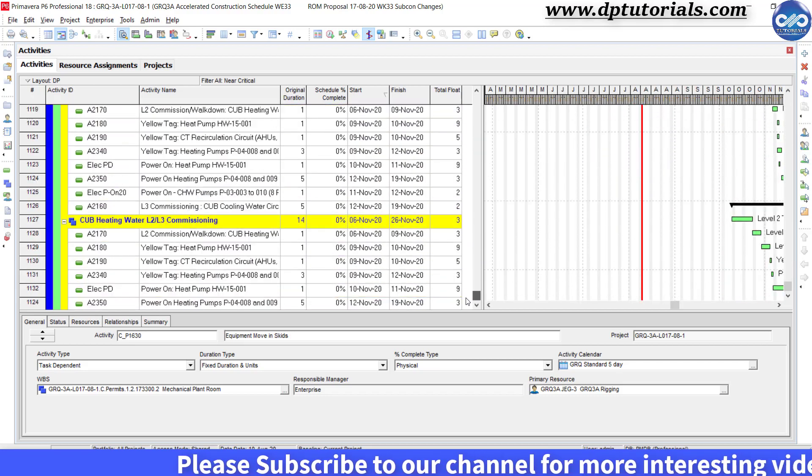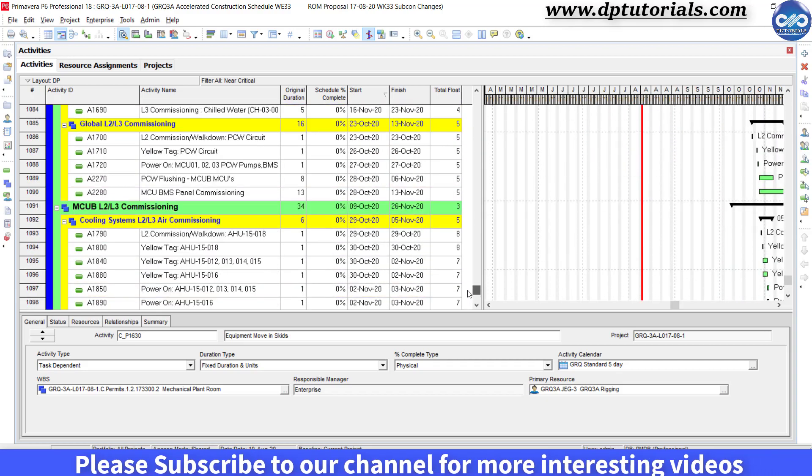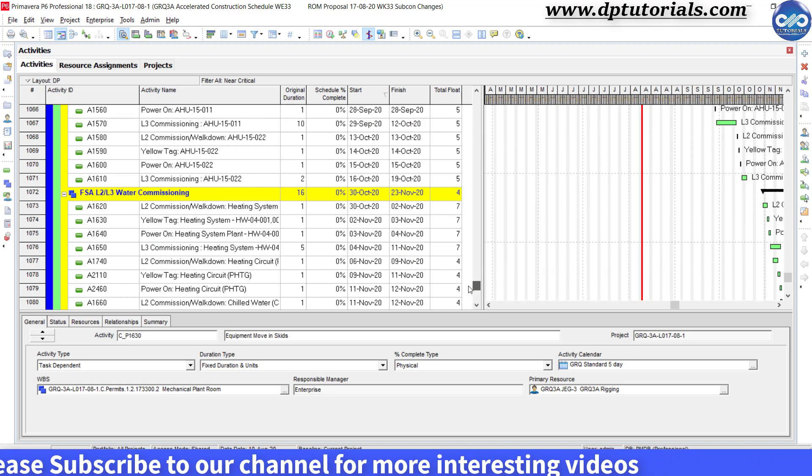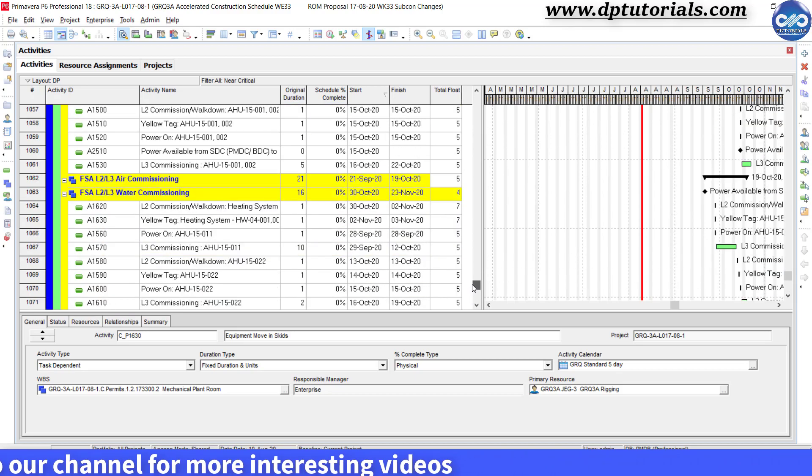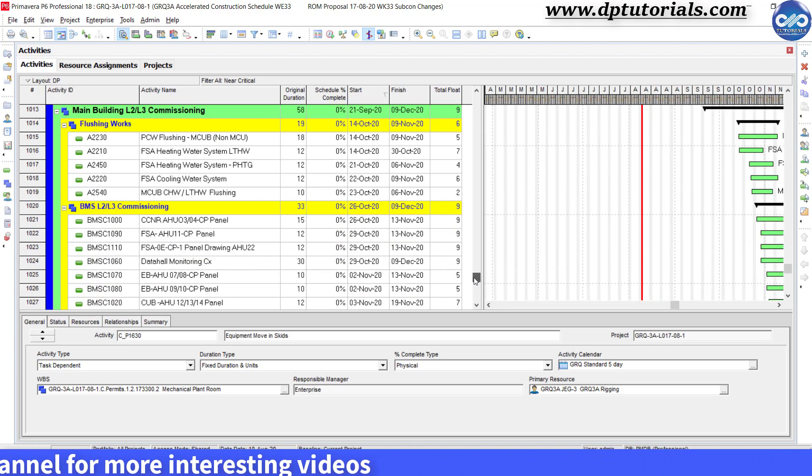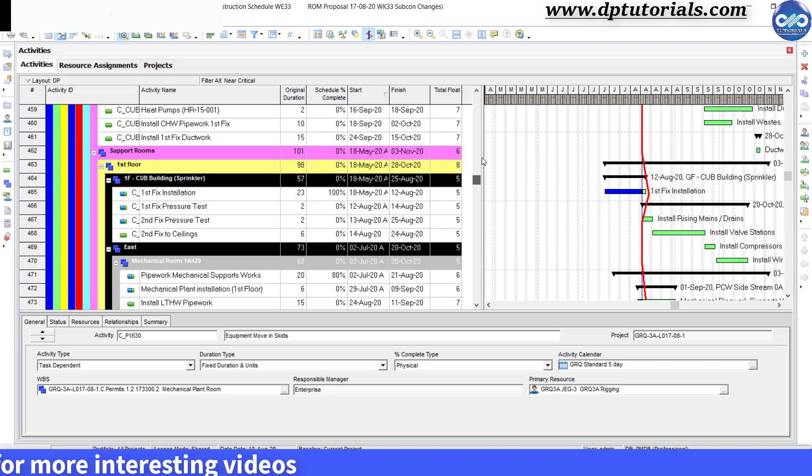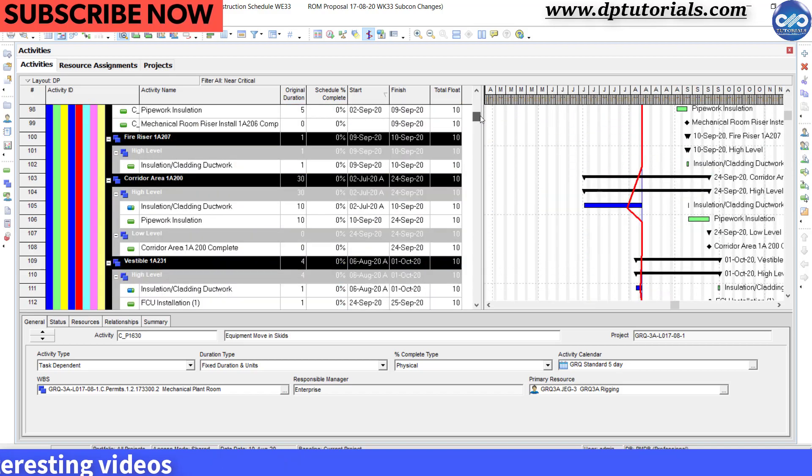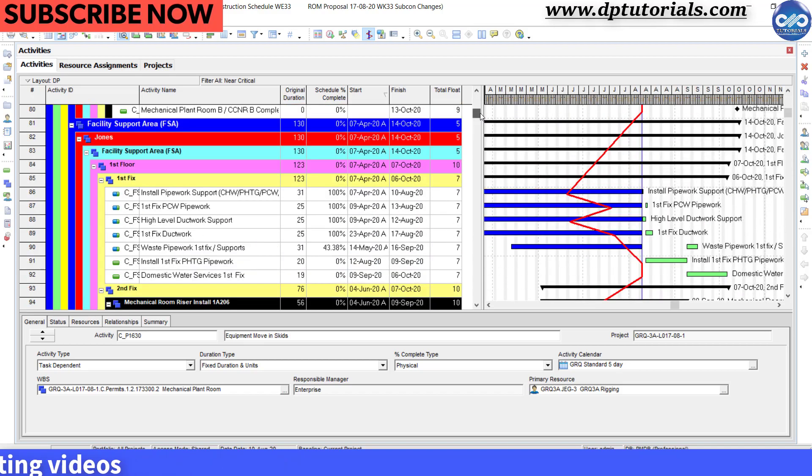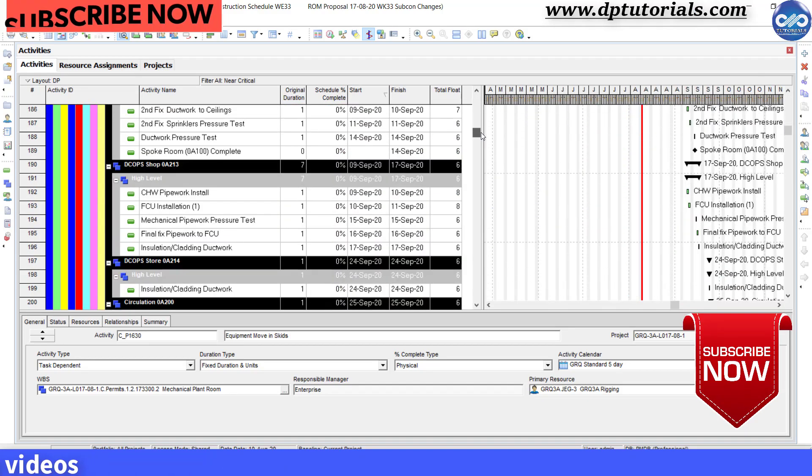You are aware that in the Gantt chart all the critical activities are shown as red bars by default. Now let us see how to create a near critical activity bar.